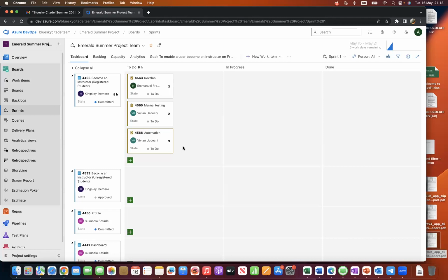And then there was another thing that happened the moment we started creating the task. If you look at the chart in the top right corner, underneath the admin profile, the blue chart, it started coming up after we started creating the task. Once you've set up your burn down chart and everything, and they start creating their tasks, your chart starts forming, because I told you it's real time. So is this the burn down chart? Yeah, this is the burn down chart now.